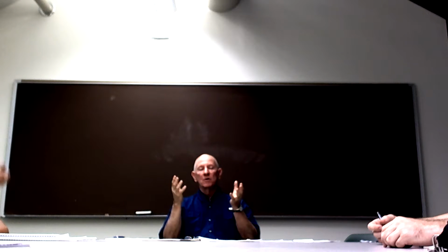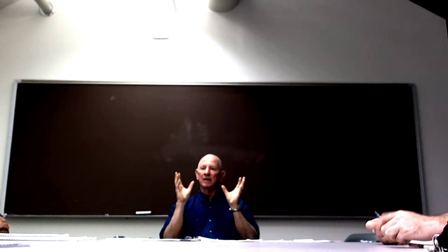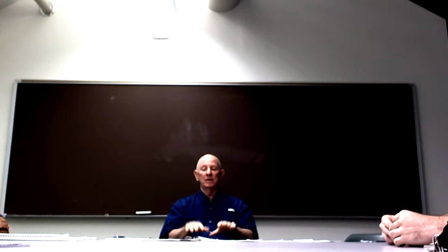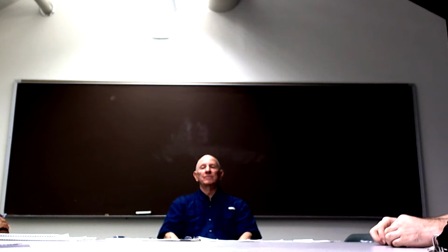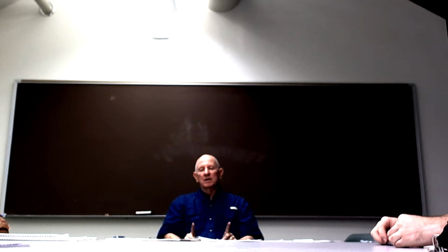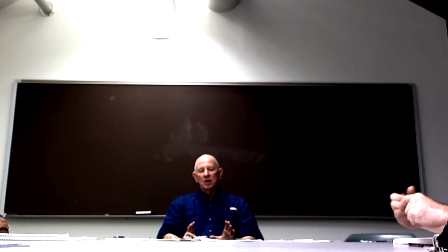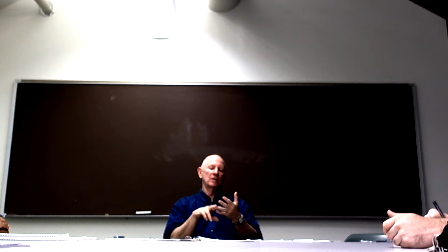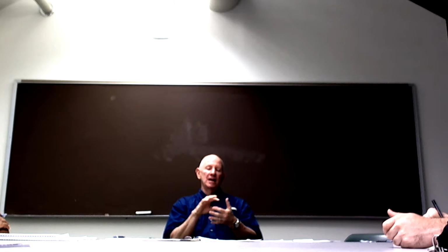So I'm going to go away and I'm going to think carefully about each piece of that input, and I want to keep minutes so that I don't lose things. And then I'm going to come back and show that, number one, I listened, I wrote it down, I considered it all. This is what I'm going to do about each one of those things.